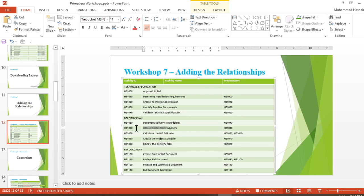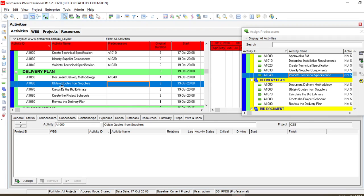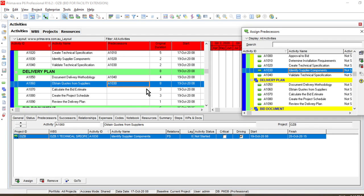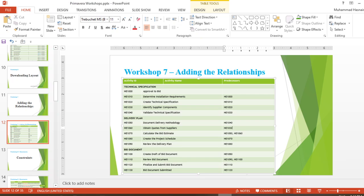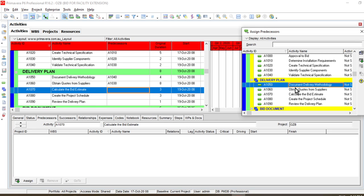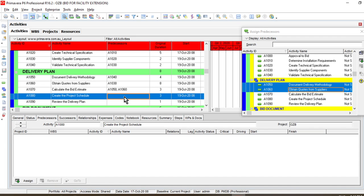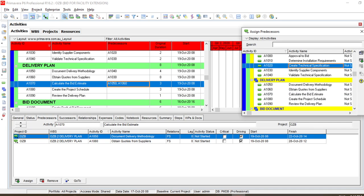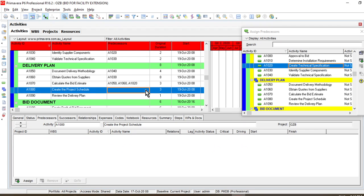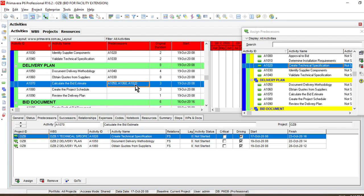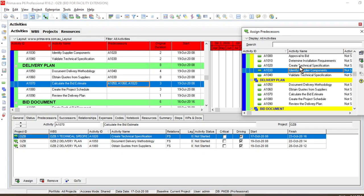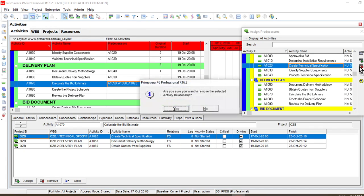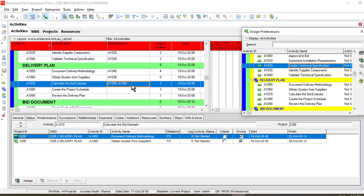The predecessor for activity 1060 is 1030. You add predecessors in this way. For activity 1070 there are two predecessors: 1050 and 1060 — you can select multiple predecessors like this. You can also delete a predecessor. For example, select the predecessor you want to remove, click the cross button, and that particular predecessor is deleted.